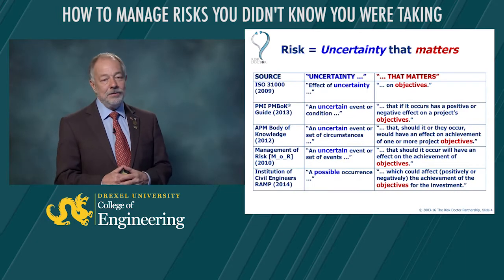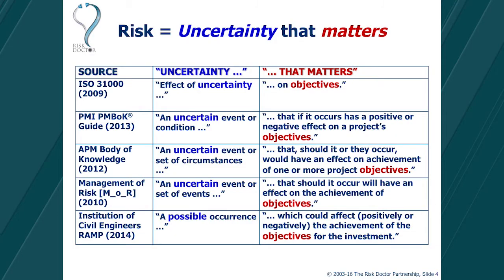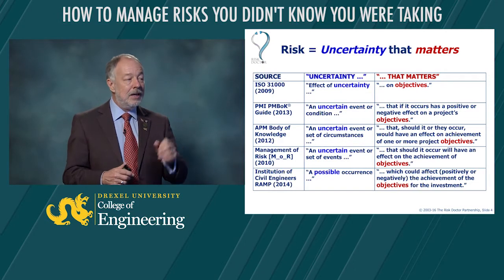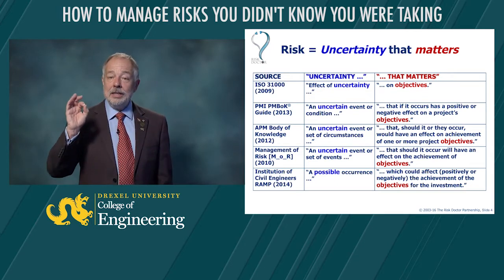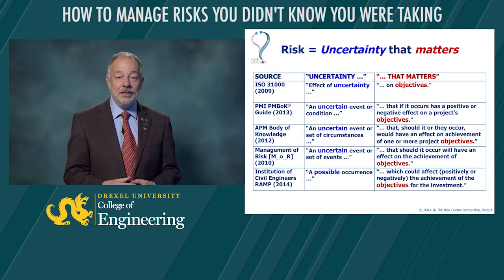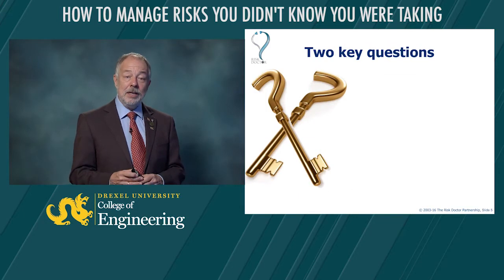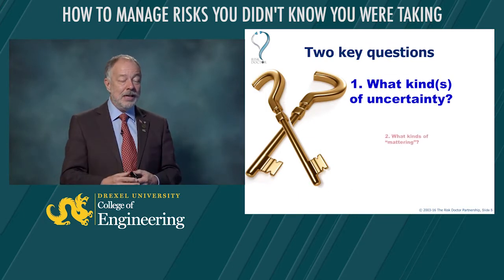We find this in a number of formal definitions of risk. Here are examples from five global project management standards where the definition of risk includes two halves: something to do with uncertainty, and something to do with what matters as defined by our objectives. The ISO 31000 standard says that risk is the effect of uncertainty on objectives. The PMBOK guide from PMI says risk is an uncertain event or condition that, if it occurs, affects objectives. You'll find these same ideas in all of these different international standards: risk is uncertainty that matters.